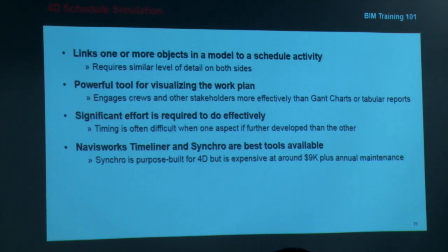But at least, under our scenario with the IFF approval, you submitted your grid to us in your model, we would check it against the contract documents, make sure it was all good to go, and give you your IFF approval. Then when you go out there, you may still have things in your way, but there'd be no dispute. If you put it in per your IFF file, the other guy's going to move. No need for RFIs. Yeah, that's right.